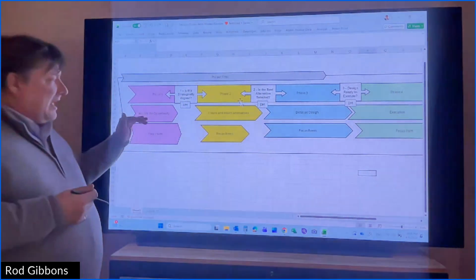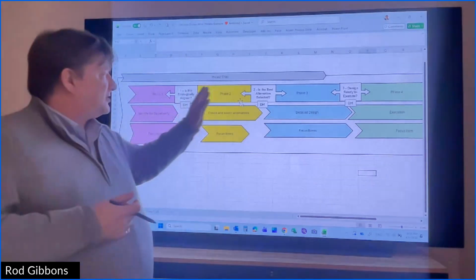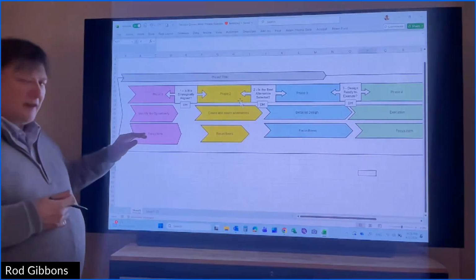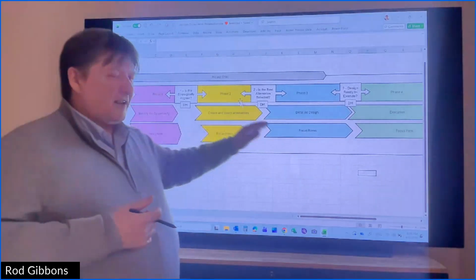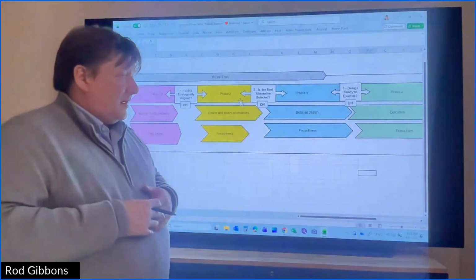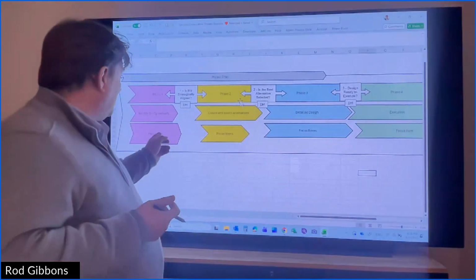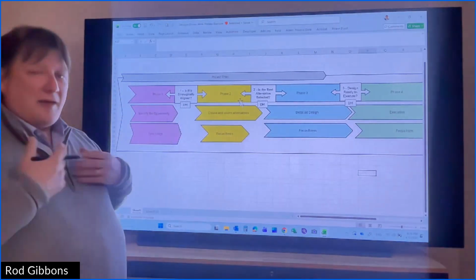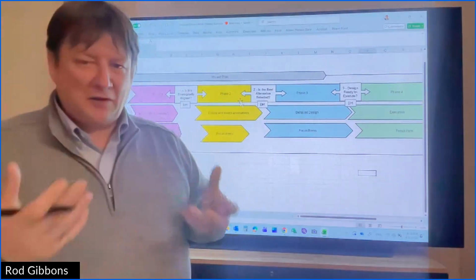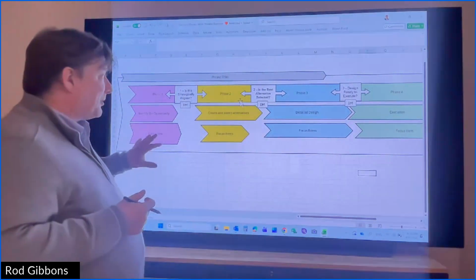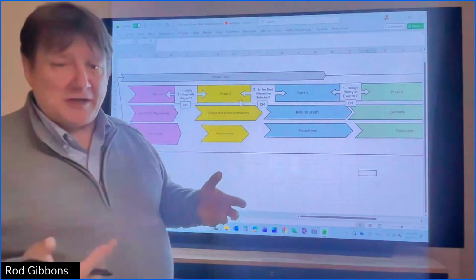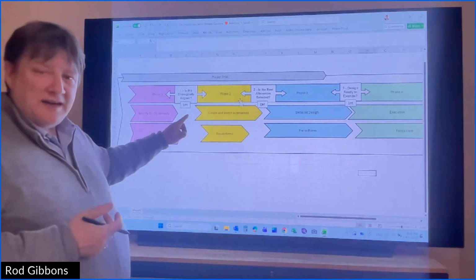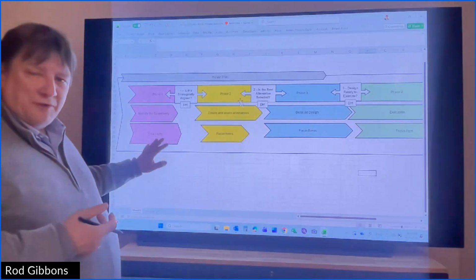So you have your phases, you have your decisions, who the decision maker is, and then the next thing to do would be to put focus items in each phase. What do you need to work on? Really, the thing that drives what a focus item is for a certain phase is the decision maker. I have some defaults, some things I'm used to, some templates where I have a list of things for certain types of projects, because this is applicable to any sort of project across the oil industry or any industry. But really, it is what the decision maker needs to make this decision. That's what you put down as focus items.